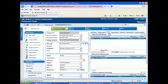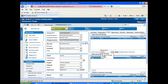Click the tasks tab to create a task. Every change request requires at least one task. Select a type of task to create. Save time by using templates. A task template is a reoccurring task that will pre-populate fields in a task.